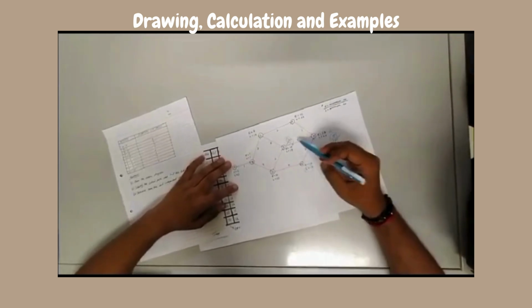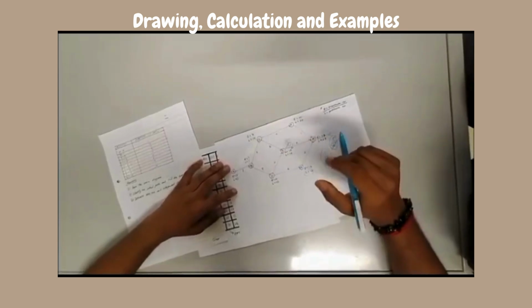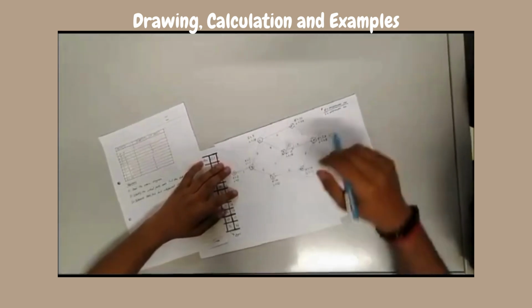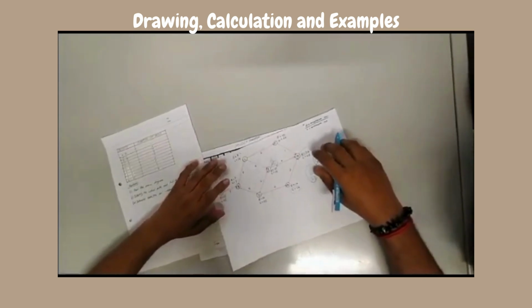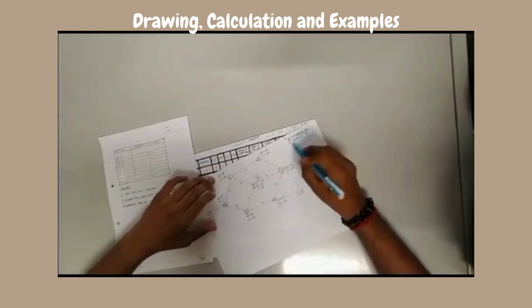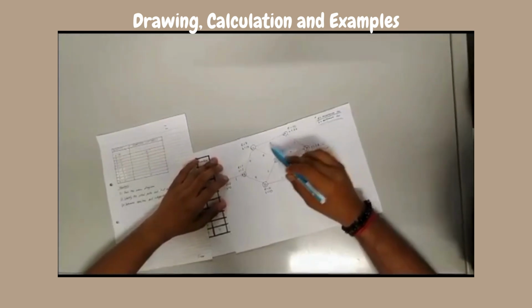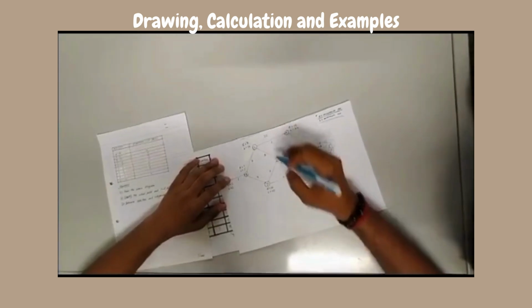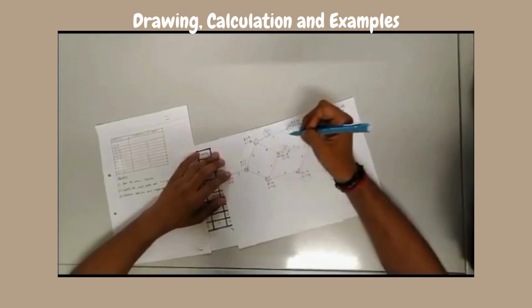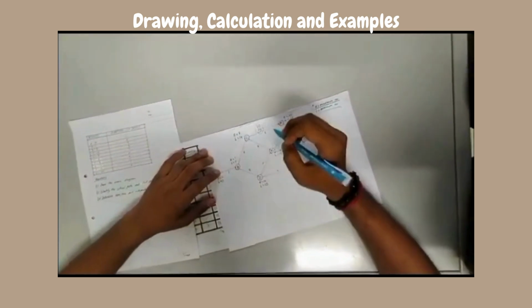Then for activities C and D, it is the same situation as just now, only that we are finding the L value. When we are finding the L value, we have to keep in mind that L is equivalent to the minimum number. So F to C, 22 minus 2 we will get 20, and then E to C, 19 minus 5 will get 14. When we compare these two, 14 is the minimum number, therefore L is equivalent to 14 for activity C.